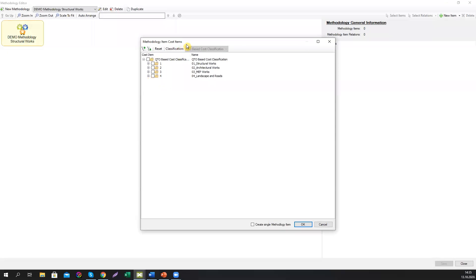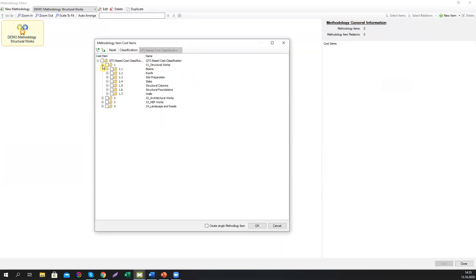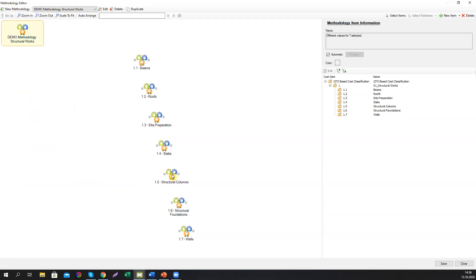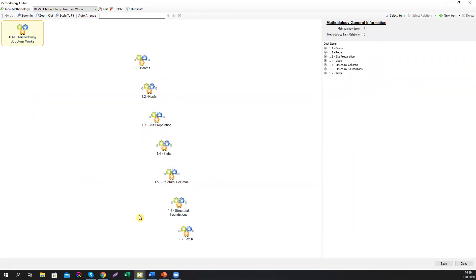Within the zones we were creating linked items connected to spatial parameters or selection sets. Here, we use the cost database as our basis. We go to the cost database, see all types of works for structural works, and create methodology items or nodes for these types of works. This is important because every single task created from this methodology will be linked with quantities, cost information, and directly with elements in the project — skipping all the manual work of assigning costs, linking elements to the schedule, and creating tasks one at a time.